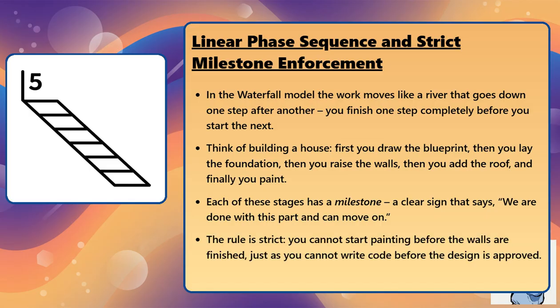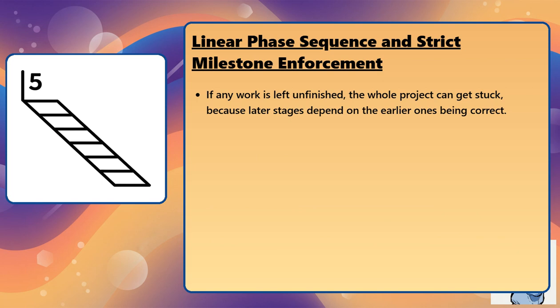The rule is strict. You cannot start painting before the walls are finished, just as you cannot write code before the design is approved. If any work is left unfinished, the whole project can get stuck, because later stages depend on the earlier ones being correct.